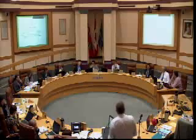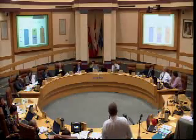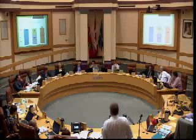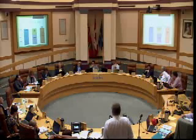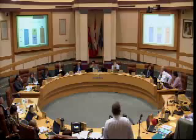Where are we at from a spend perspective? So this is a more graphical presentation of the same information. The budget on the left, $20 million. The final funding is showing development charges $11 million, sale of land is $8 million, and the debt approval is up to the full budget amount of $20 million in the event that we had no inflow of DCs or sale of land.